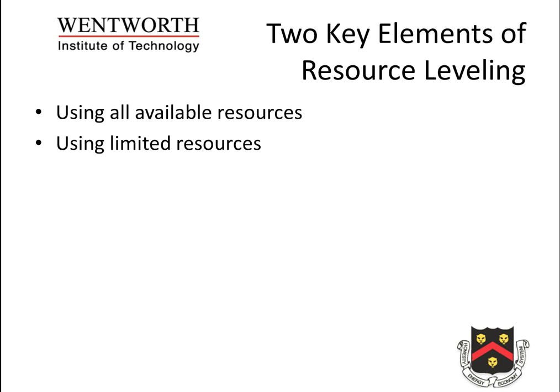As the main aim of resource leveling is to allocate resources efficiently so that the project can be completed in the given time period, resource leveling can be broken down into two main areas: projects that can be completed by using all resources which are available, and projects that can be completed with limited resources. Projects which use limited resources can be extended over a period of time until the resources required are available. If the number of projects that an organization undertakes exceeds the resources available, then it's wiser to postpone the project for a later date.